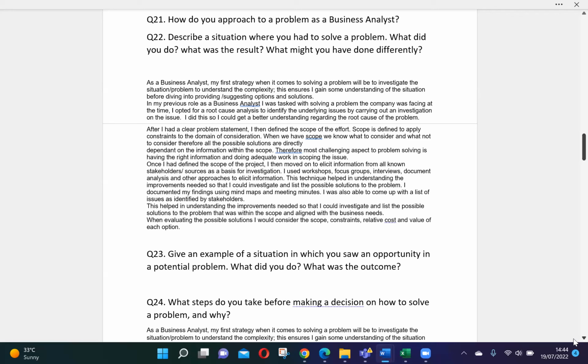Now, what might you have done differently over here? If you don't have any idea, you can say that I could have connected with the dependent teams who had impact, and I could have requested them to plan a release, as it was an urgent change from the customer. I could have done that change, but I did not do that. So this is what I could have done differently, like that you can say.